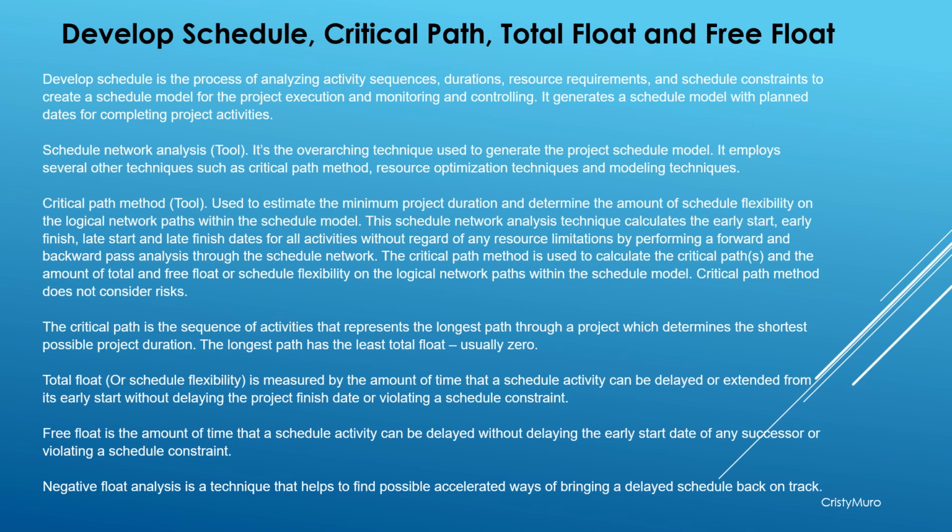Schedule network analysis. The schedule network analysis is the overarching technique used to generate the project schedule model. It employs several other techniques such as critical path method, resource optimization techniques, and modeling techniques.